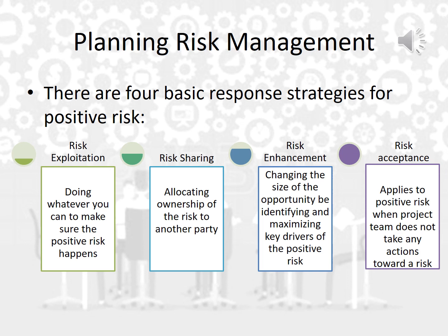So here, I can share the responsibility of making sure that only positive risk happens, making good publicity for me as a company, by allowing other parties to help me in that objective. So I will include the school principal, I'll include the school board, and so on. Another party will come together, and their efforts with my efforts will help to share that risk and focus on the positive risk. Number 3, called risk enhancement.